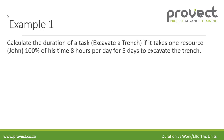Now let's do example one. Calculate the duration of a task — let's call it 'excavate the trench' — if it takes one resource, John, 100% of his time, that is eight hours per day for five days, to excavate the trench. The work or effort is five days at eight hours per day, so eight times five equals 40 hours.